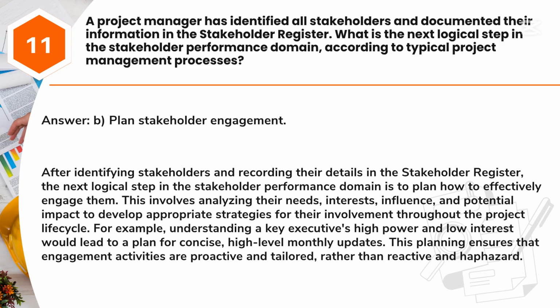Answer: B. Plan stakeholder engagement. After identifying stakeholders and recording their details in the stakeholder register, the next logical step in the stakeholder performance domain is to plan how to effectively engage them.